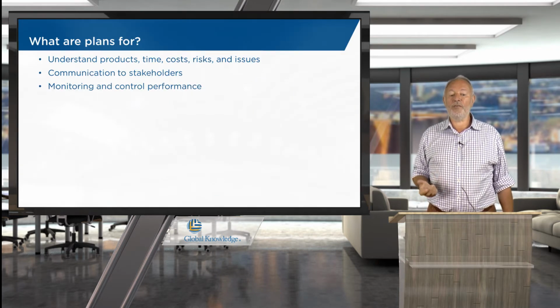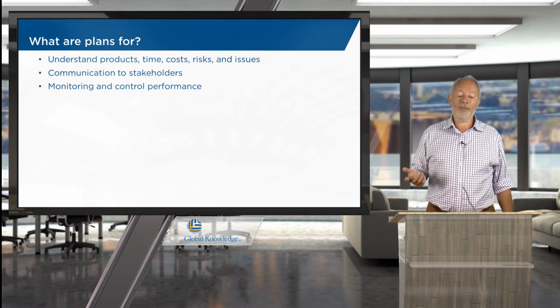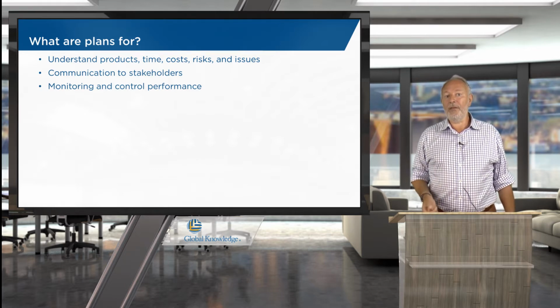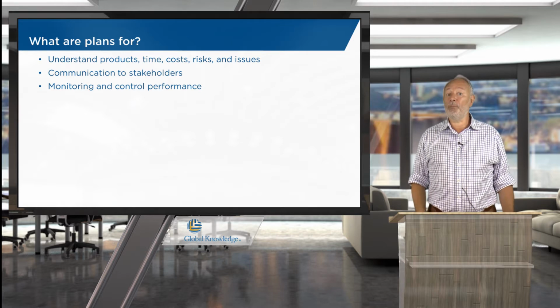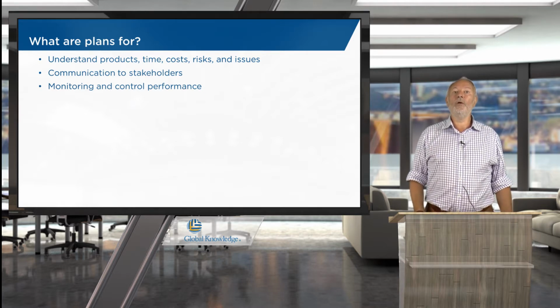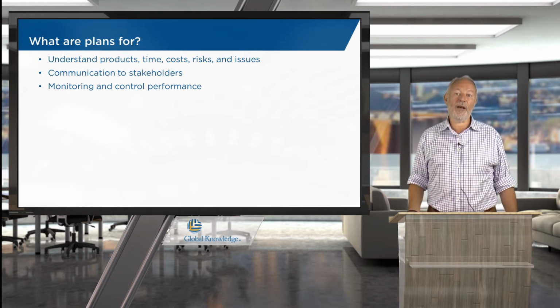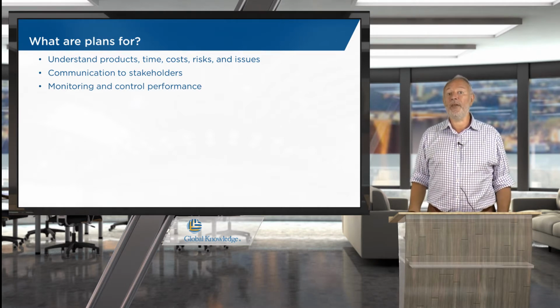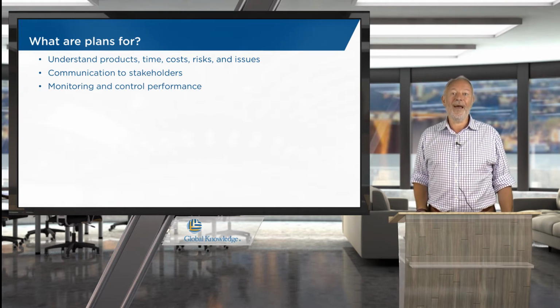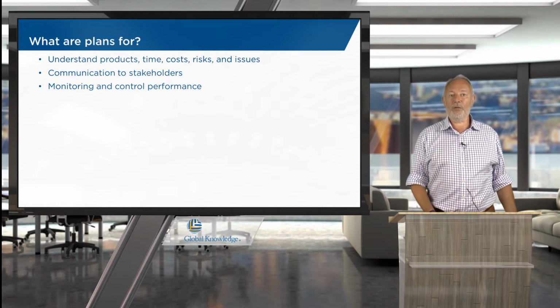One of the key philosophies within PRINCE2 is product-based planning. This is where we're going to plan based on products rather than our normal way of thinking and communicating, which is through activity. That doesn't mean to say we're not going to use activity, it just means that we'll be thinking about the products first and the activity afterwards.